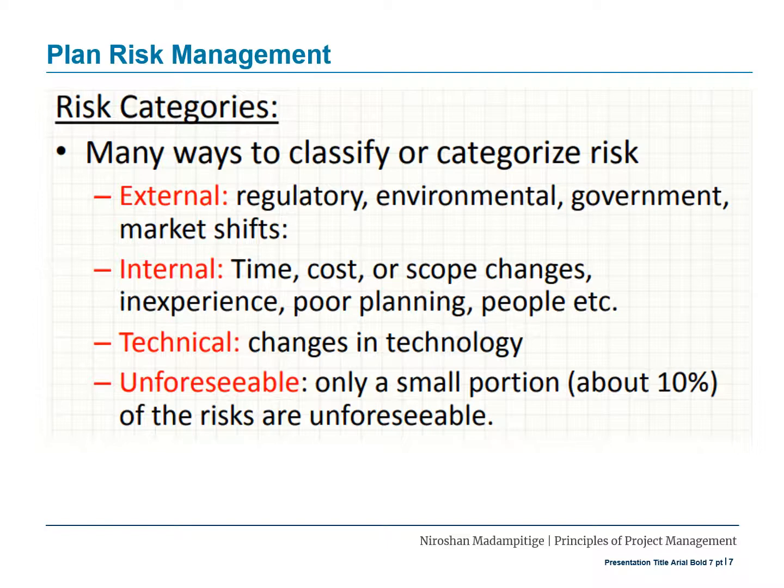You can agree on the best possible approach and actions to come up with the most appropriate response for internal risks. The third type is technical risks — these relate to changes in technology or anything to do with technology that becomes an issue in the future. The fourth type is unforeseeable risks. Only a small portion — about 10 percent — of risks are generally unforeseeable. These are risks very difficult to forecast; whatever planning you do and however deeply you analyze, you will not identify them in advance.